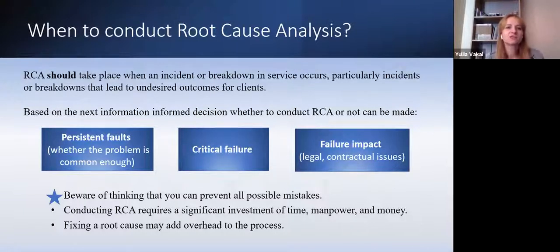And again, try with probably Pareto analysis. Take this 20% and try to break it down. Even within this 20%, you can apply other techniques, but we assume that this 20% should represent the whole group. And once you start to conduct root cause analysis regularly, you will see the patterns. You don't need to do it for your hundreds of defects. I'm pretty sure you would start seeing the patterns.